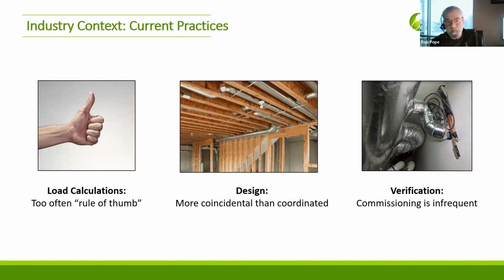From the mechanical contractor's, the HVAC contractor's point of view, usually the situation is the house is built, the structure's up, then you get the call to go and give a price. By then you've missed so much opportunity in designing a more appropriate system for that house.